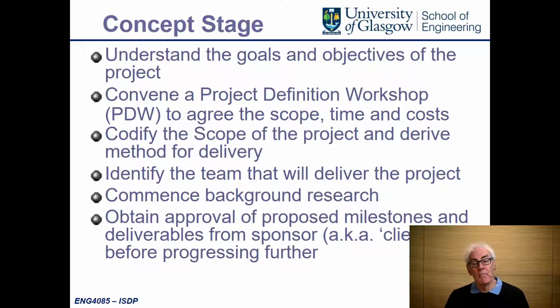And then look at background research within the project to find out about the areas that you may not be fully familiar with. The last part of the concept stage is the most important. You need to gain approval from your sponsor or your client before progressing further, because it's important that you deliver the project that they want, not the one that you want to work on. This is a key part, and often a part that many engineers fail on: they do the clever engineering, but they fail to get buy-in from the customer, and hence the project fails.